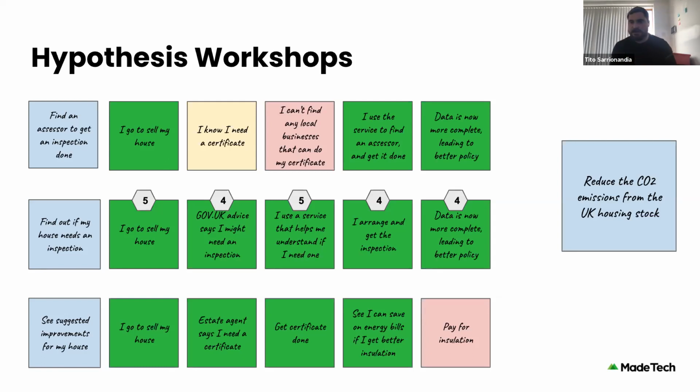Think about that edge case pipeline. Before you do this, they're all kind of equally weighted. And obviously, if everything's important, then nothing's important. And it gives you a much better way to think about risk as you're doing your migration, as you're doing your modernization. You can be thinking about, well, what are the things that we truly cannot risk, right? That must come over. And what are some of the things where you think, well, that can be a learning exercise, or that could be something that we solve later if we need it at all.